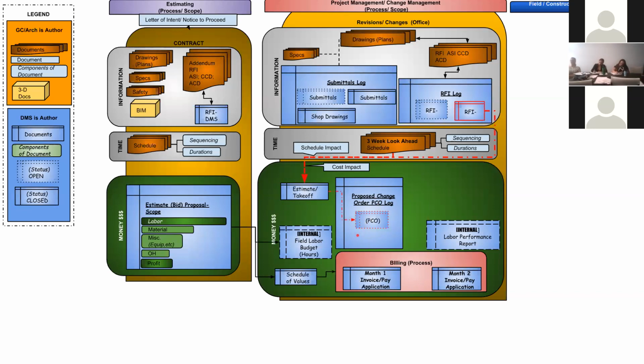When we get into Pro Contractor, the terminology for this changes, and we'll talk about that more at that time. But in every company that I've worked for, this has always been a standard. Everything we're covering right now is a standard process. You're looking at new bits of information. How does it affect the time, and how does it affect the money in our scope of work? We take that PCO, create a calculation, determine labor, material, equipment, miscellaneous items, overhead, and profit. That gets put in and sent over to the general contractor.